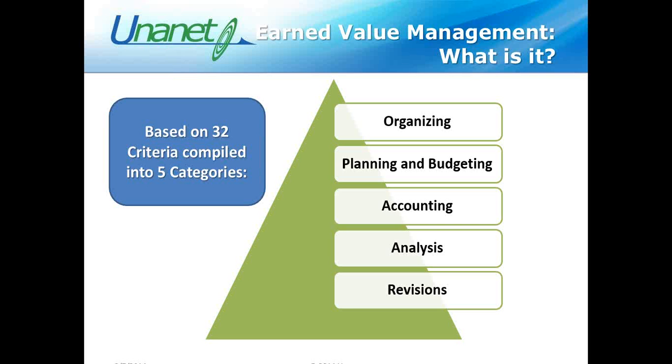The second category is planning and budgeting. How are you going to schedule your work? Are you going to have milestones? Will you set up a time phase budget? Are you going to have significant cost elements, discrete work packages? Will it be level of effort or billable projects you're putting together? And that's how that planning and budgeting piece comes into play.